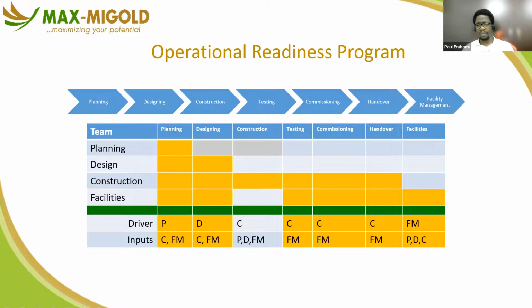You get that template, just like a lab test. When they are going to do a lab test for you, you already should know what the normal range should be for whatever line item they are testing, so that when the test result comes out, you already know whether you fall into the normal range or you fall out of the normal range. So without that testing set of documentation, there's nothing like testing.